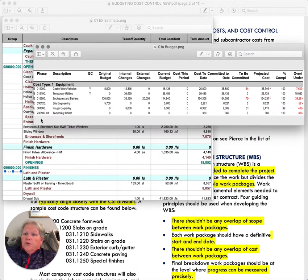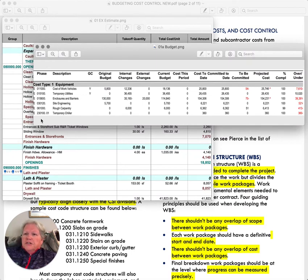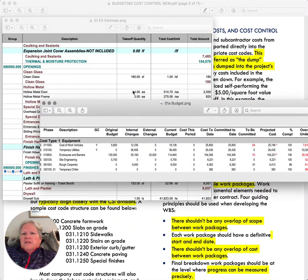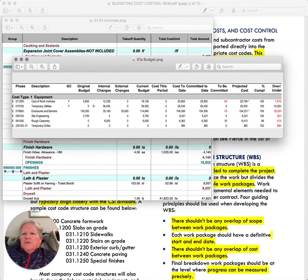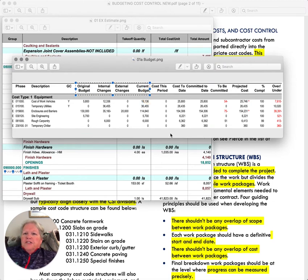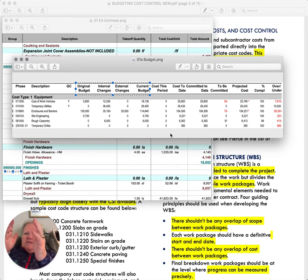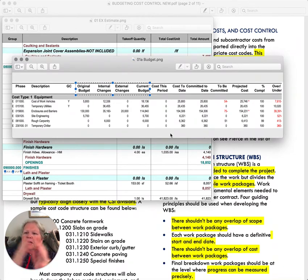Cost types include equipment, labor, material, subcontracts, purchase orders, and indirect costs. At our company, we have a cost type for indirect costs that covers labor burden, bonds, and insurances — things applied on top of the total number so you can track them. Your budget itself will have columns such as the original budget. One thing that's unique about AIC examples is they tend to intermix budget categories and cost categories rather than keeping them in separate places.